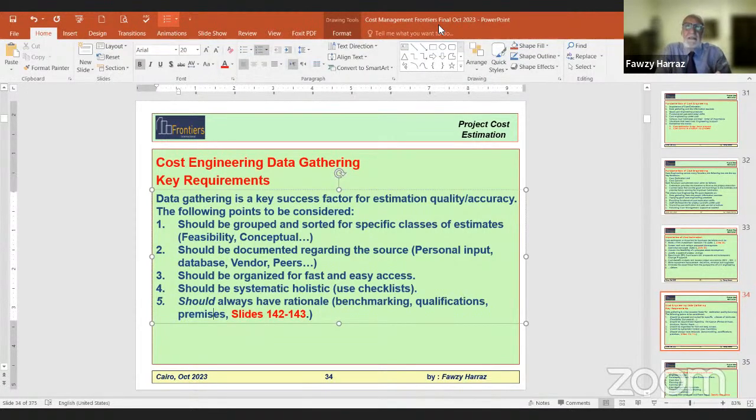At the end of repeated notifications from the owner or consultant to the contractor to improve, catch up, and do this, if he's not doing it, then you say the contractor is in default, and you go to the contract clause for suspension or termination by default. In this case, you will hold all the contractor's on-site equipment, you will hold the performance bond from the bank, and then you will invite the next bidder in the bid process. You consider him, maybe starting confidentially from the beginning, discussing the scenarios and how much he will ask to complete the remaining work, and you will complete the scenario and make it back to back. You end this one, and then you get the next bidder on site to complete.